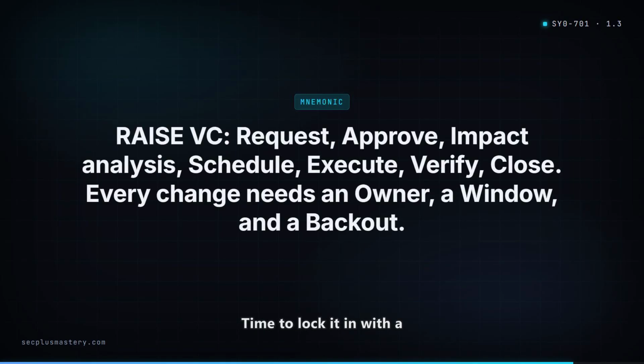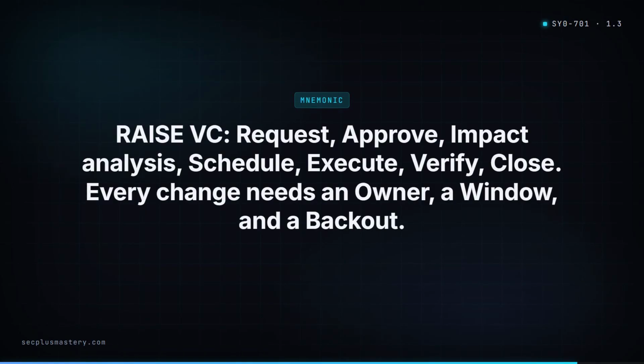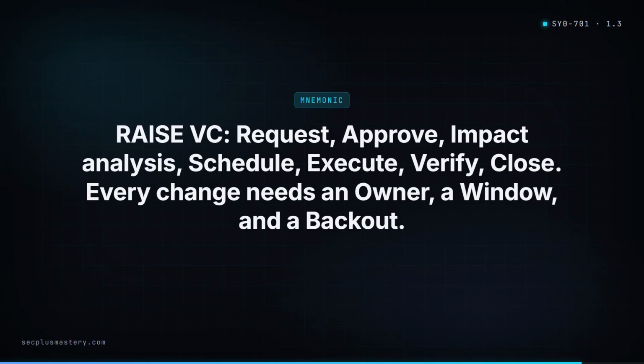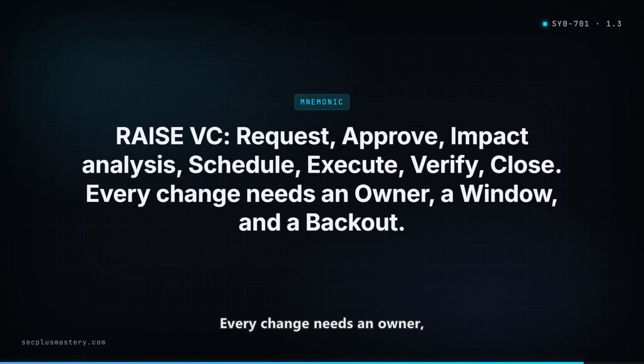Time to lock it in with a mnemonic. The lifecycle is raise, request, approve, impact analysis, schedule, execute, verify, close. And pair it with this. Every change needs an owner, a window, and a backout.